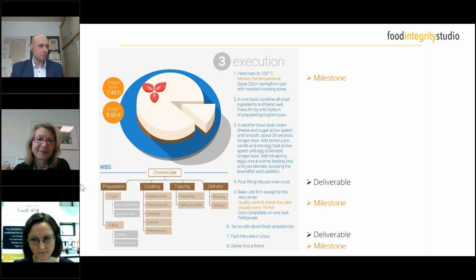then, for example, involved here in the deliverable, which we achieve in work package 7, where we then have the cake plus the packaging material that has to be biodegradable. So yes, this can clearly be additionally defined and would probably go in as a quality criterion of the deliverable, or if it's highly important, even one of the specific objectives of the project.